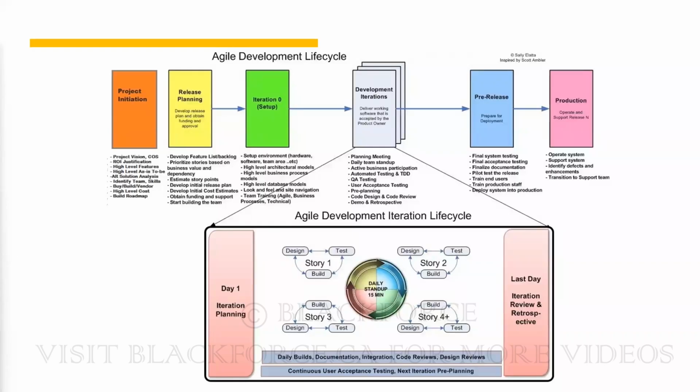The Scrum Master will look at it and say, okay, if you want us to focus on this bug, some of the features we wanted to do, can we move them back to the backlog because my team will be overwhelmed? I've looked at their velocity. They won't be able to finish all that work. They've estimated it. I think we're able to do the bugs and just 2 more features. The Scrum Master is making sure the development team is all right, that they are doing the job, because the Scrum Master understands the development team. He's feeling them, checking the details of their work, making sure everything is working fine. So you always have that Scrum Master and the product owner.